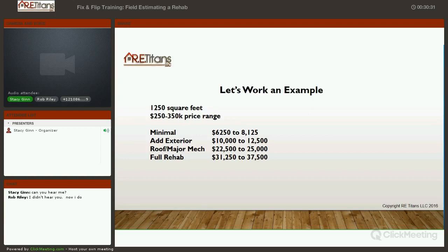There's a direct correlation. A good example, especially in a subdivision, and I've seen this a lot of times, is that you look at Formica tops versus, I hate to use granite because granite's gotten so expensive, but you use two different countertops, or you use stainless steel appliances versus painted appliances. You can't base your estimate on doing the lower end stuff and get the higher end price.